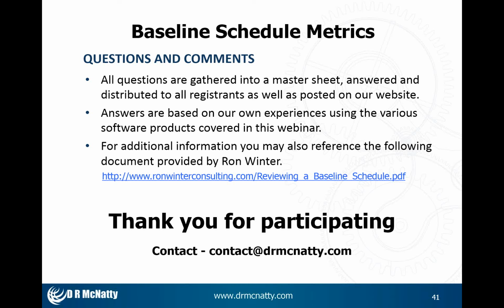Well, that has nothing to do with an original baseline, everything to do with an update. I think any information that you can get from different perspectives helps. If I ask someone how many days are left and ask him what date he expects to finish, and they don't coincide with one another, then I need to get that straightened out.